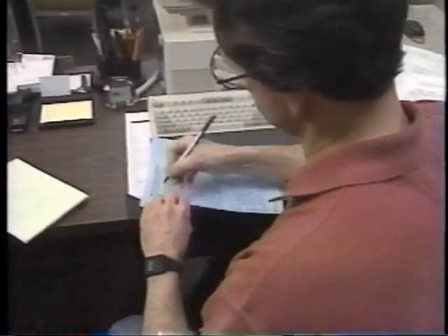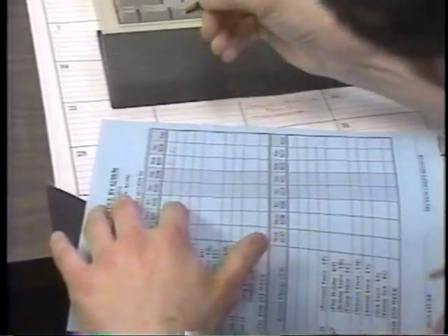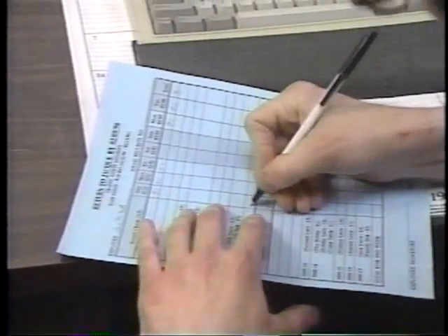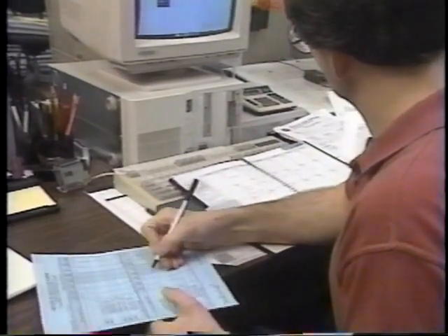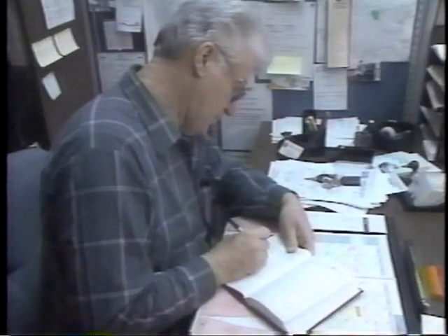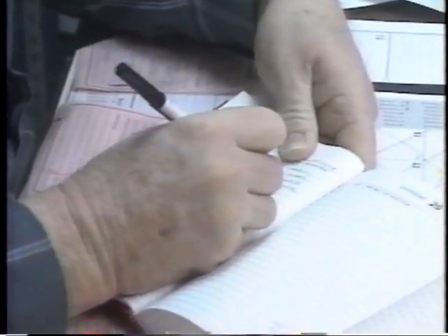Reports may be daily or weekly, but the man-hours used on each activity should be recorded daily for accuracy. Existing timesheets may be modified to collect the man-hour information. The man-hours used must be tabulated to prepare the manpower status report for the engineer in charge.